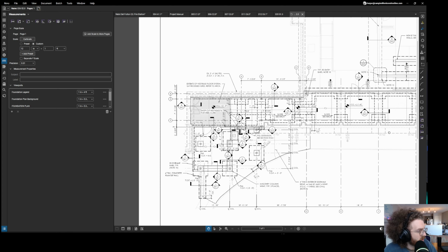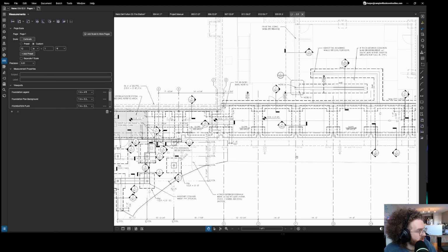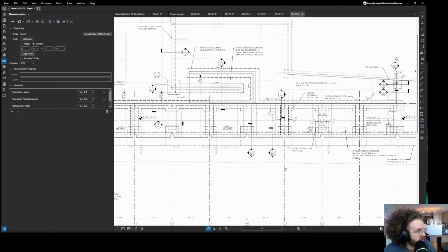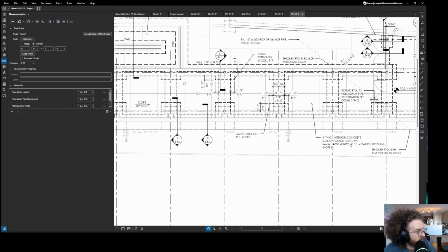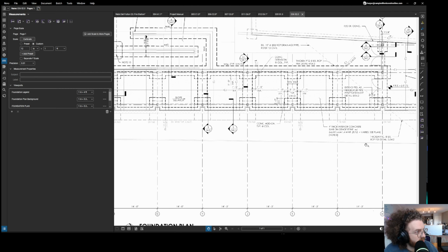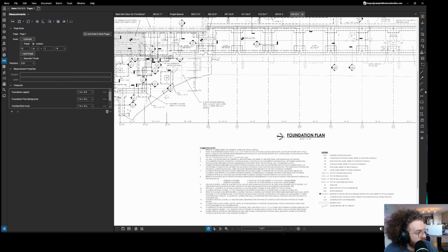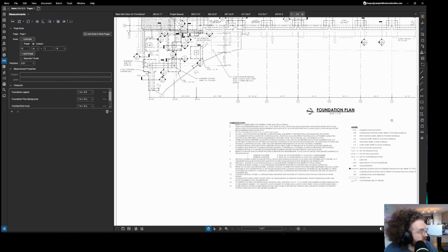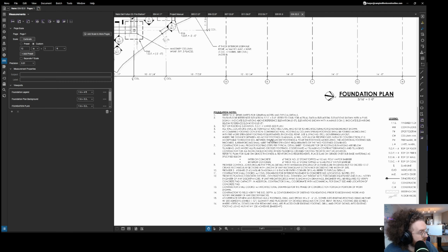I'm looking for a line where it tells me how thick this slab is. And right there, 4-inch thick interior concrete slab on grade, reinforced with welded wire fabric. So what that means is that it's slab on grade. It does not mention fill. It doesn't mention granular fill, so we wouldn't figure that.